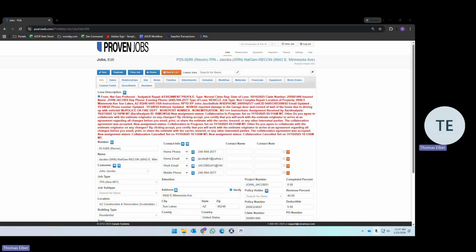That's a regular occurrence weekly for all of your currently in production jobs. You'll also be providing operations a job update or job updates for all your jobs, a work schedule, and any COS or project sign off that you get. Additionally, the final photos will be provided by you to operations into PSA for final job sign off, as well as that last documentation. To the estimators, you'll be giving them revision or supplement requests.